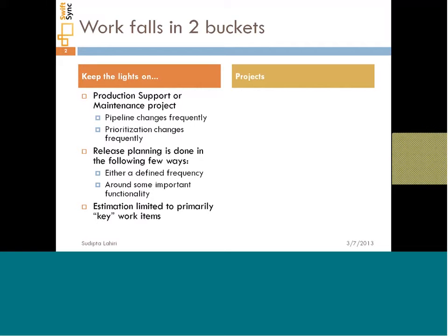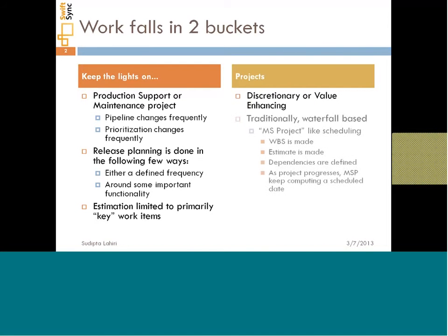The other bucket of the work falls in what we typically understand as projects, which obviously have a defined end date and a defined objective to be accomplished. And flow of work is very typical waterfallish. You start with a scope decomposition, you would then do a task decomposition, you'll build a work breakdown structure, you'll make estimates, you'll then define dependencies, and arrive at an end date in terms of when the whole thing is supposed to end.